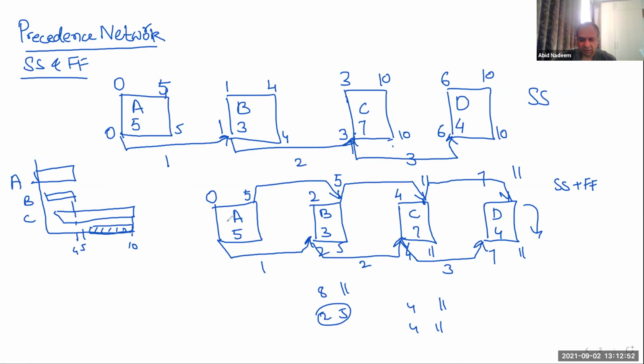And then similarly, it should be 5 and 0. From here, it should be 5, and 5 minus 5 is 0. And from 2 minus 1, it is 1, and then 1 plus 5 is 6. So we will take this option over here, 0 and 5.